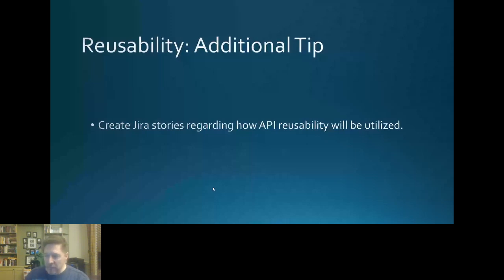So very often, as I mentioned before, companies start with the siloed project work, and the JIRA stories are all about take this data from this system and put it in this system, right? But if they want reusability, ask them to write a JIRA story about what it'll do for their business and how it'll be utilized. If they can do that, I think you can go a long way towards actually planning for reusability, because designing and building reusability takes a little bit more thought and work, and therefore a little bit more time than, say, writing a very simple point-to-point data integration.